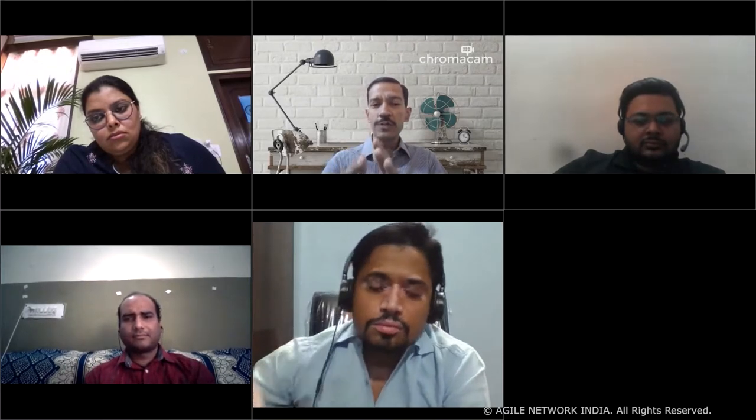So we should control this particular point. Another point I think is: if a change request is quite big and is going to take a number of days, and the new change request is not an essential feature of this current release, then try to convince the client to put this change in the next phase of the project. I think this was the point which Megha mentioned earlier, that this is "not now," right?